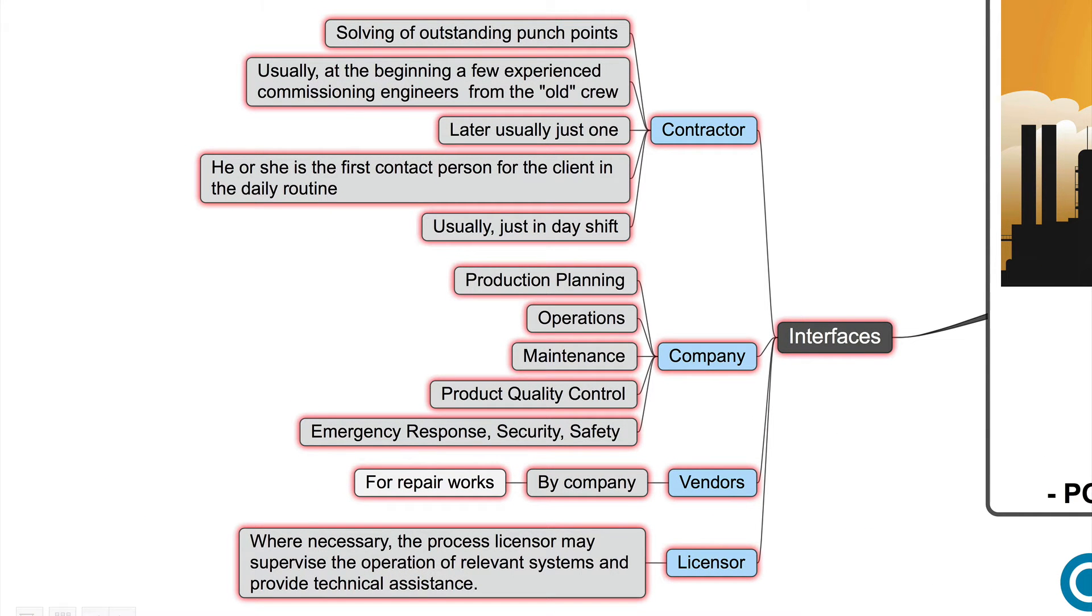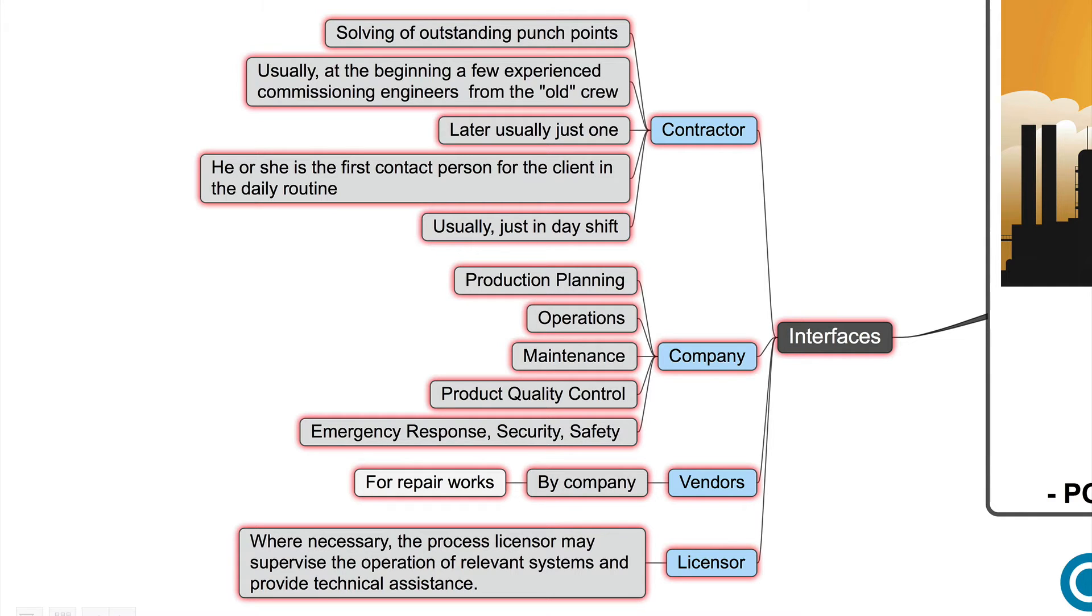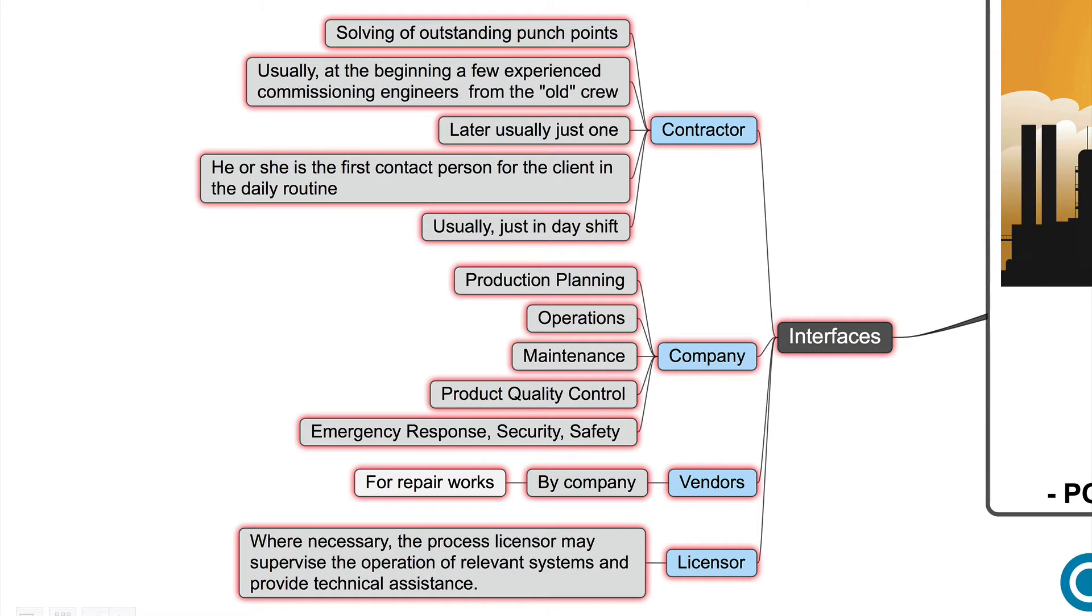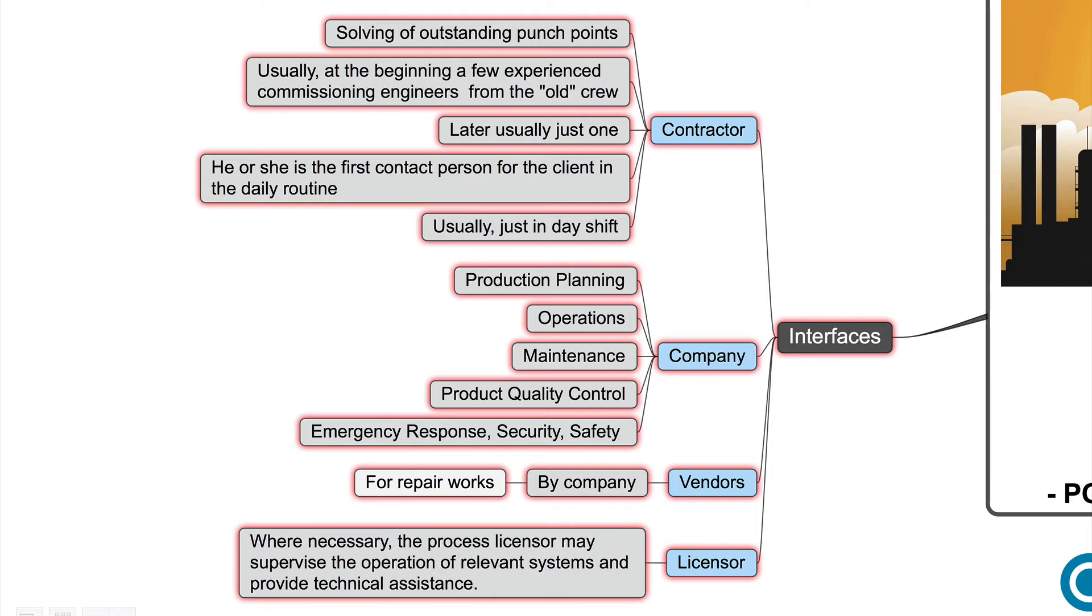Our interface during post-commissioning looks a little bit different. The contractor is responsible for solving the outstanding punch points. And usually at the beginning of this period, a few experienced commissioning engineers from the old crew stay on the plant. With old crew, I mean the crew who commissions the plant. Because these guys are really experienced and they know blindly where to go if there is a problem. But later, maybe after a few weeks or months, there is usually just one commissioning engineer. And he or she is the first contact person for the client in the daily routine. And usually, he is just in day shift.